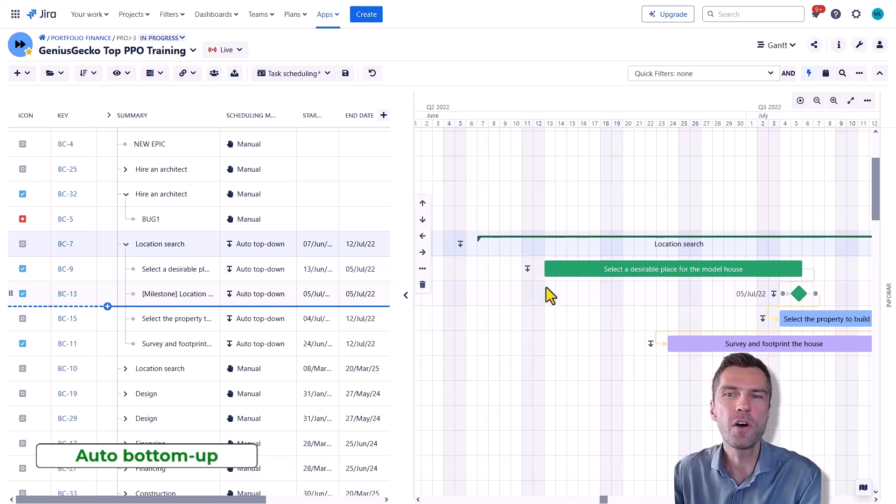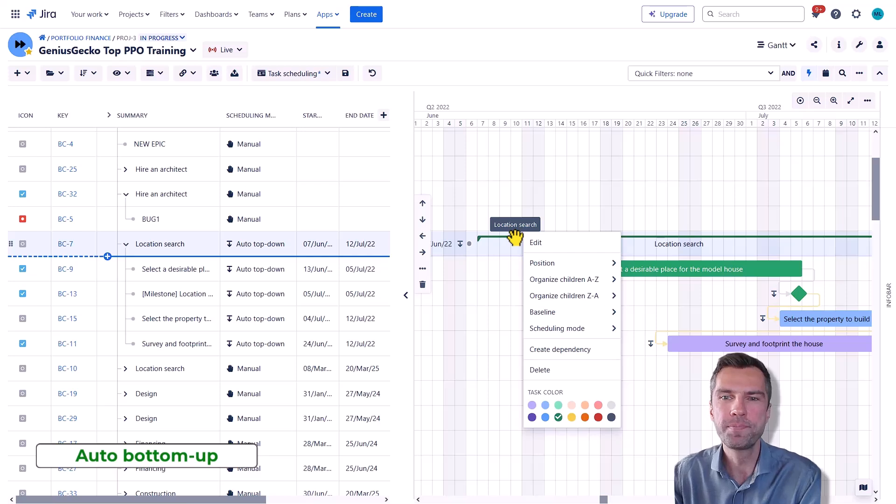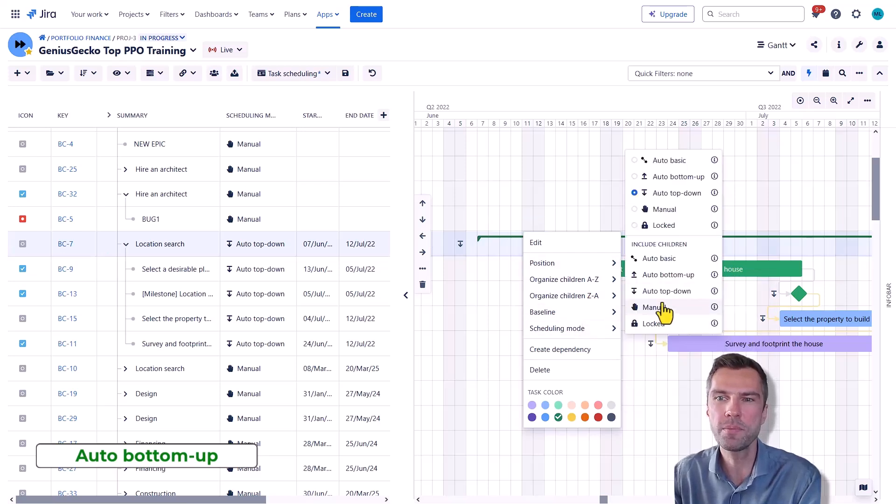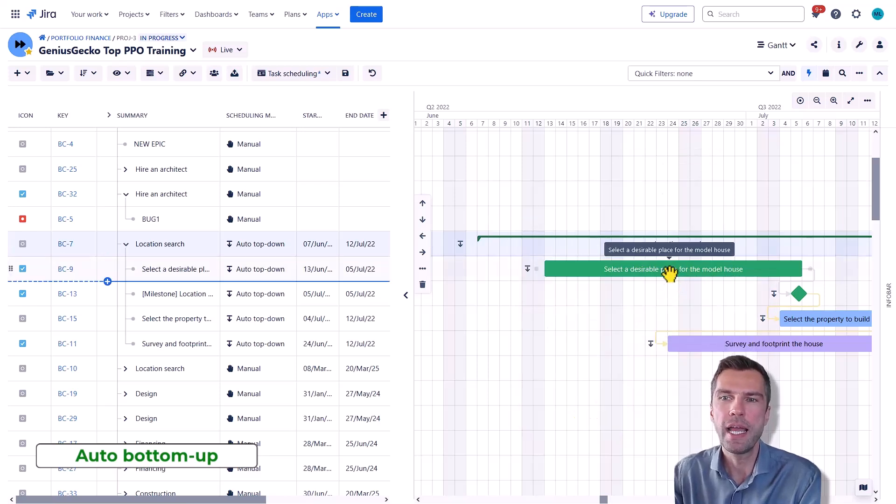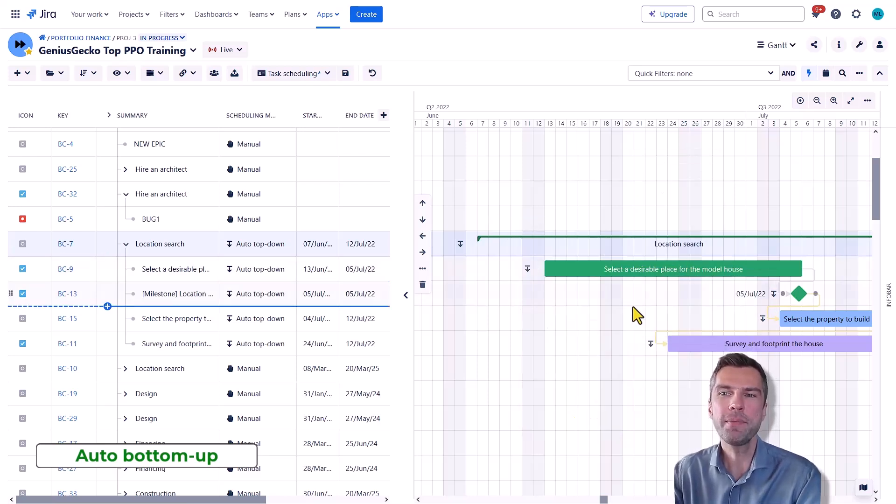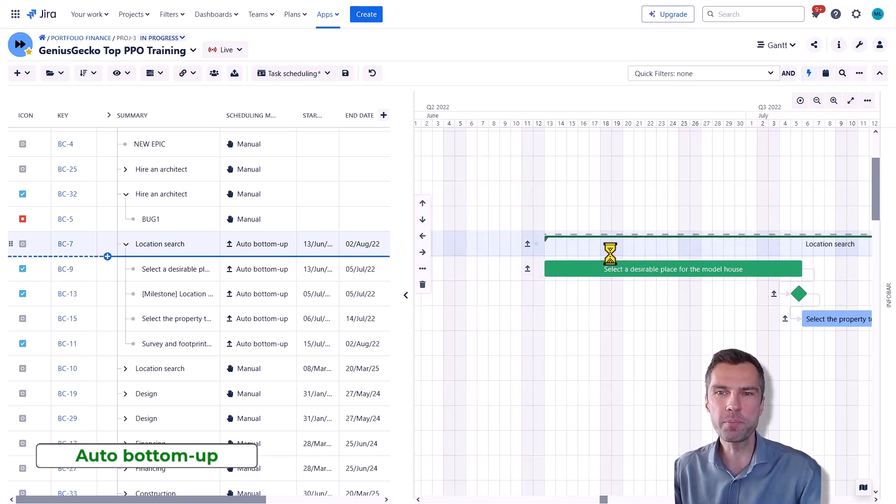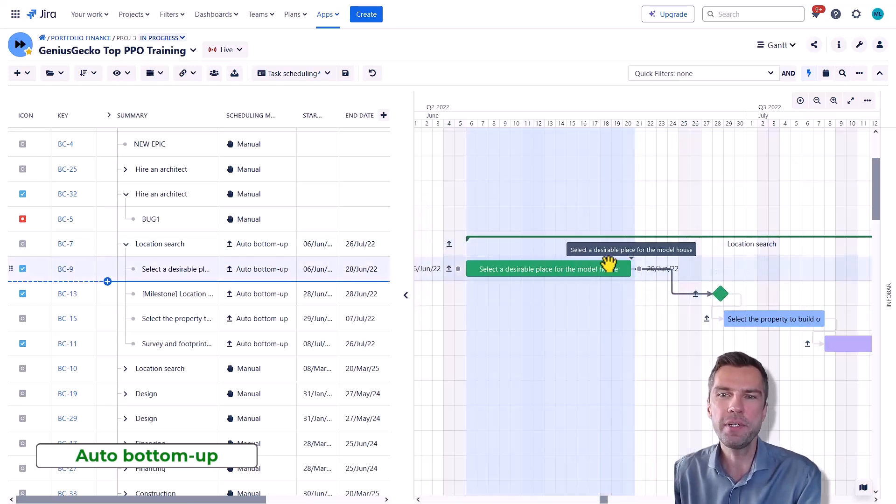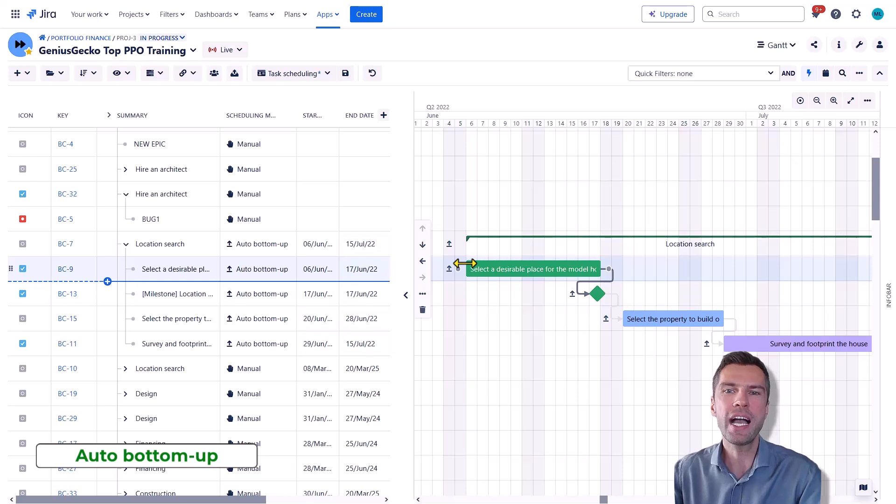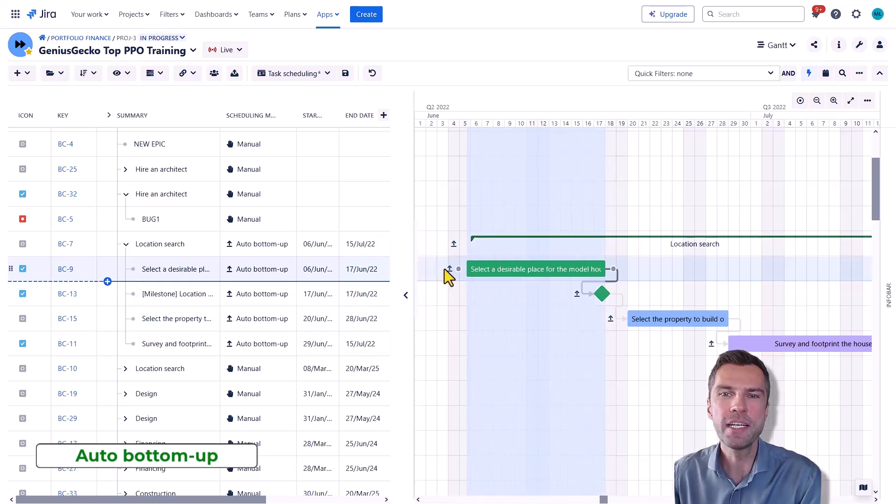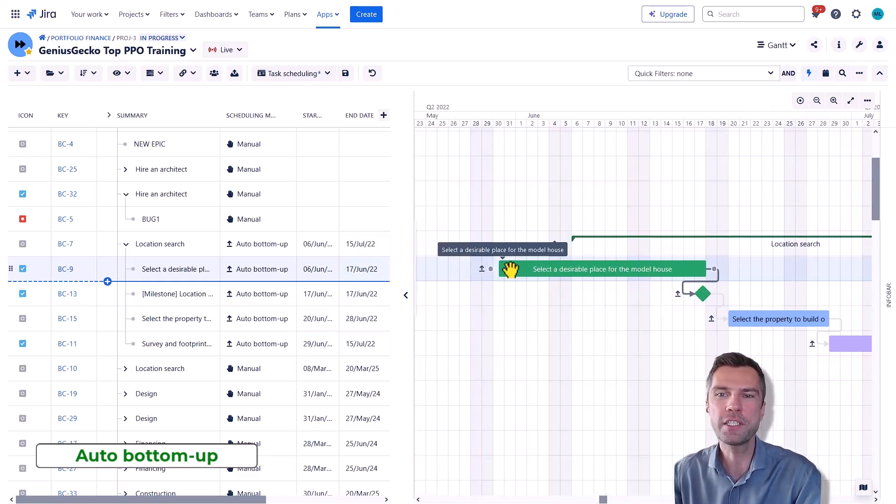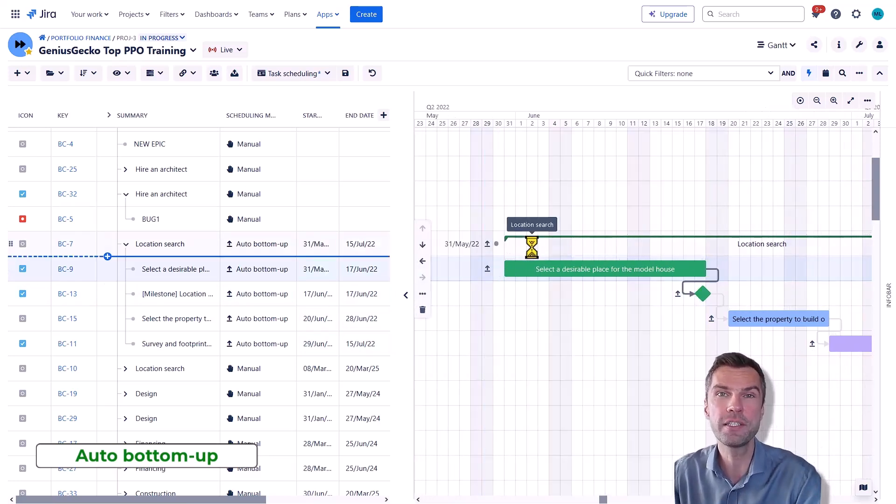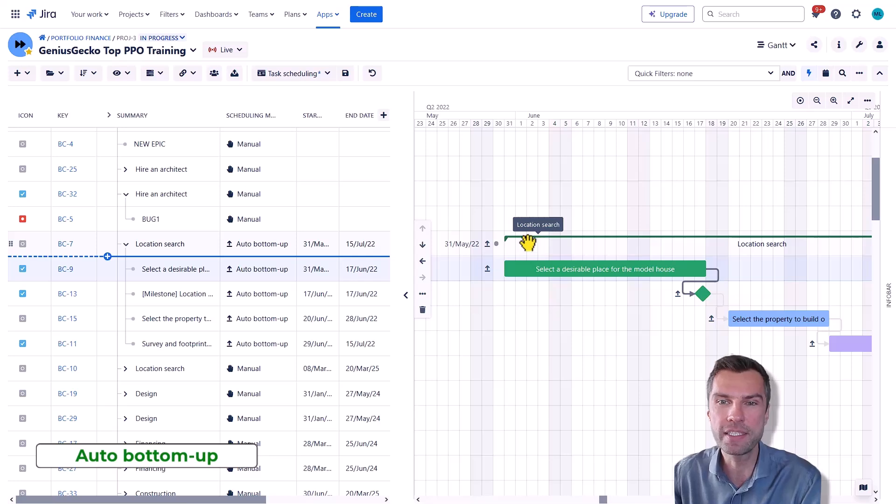Mode number two, auto bottom-up. Let's again change to auto bottom-up and this time again, I can move the whole branch. I can readjust the children but the children actually determine the duration, the start and end date and the duration of the parent task.